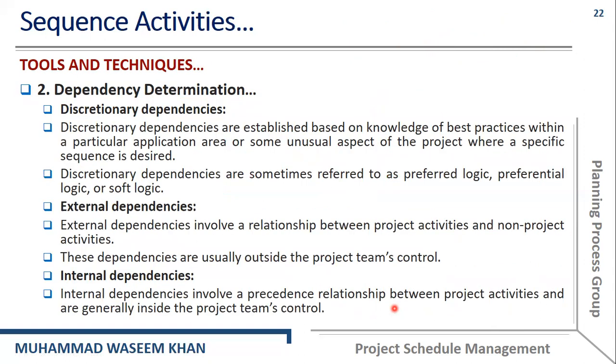The next one is discretionary dependency. Discretionary dependencies are established based on the knowledge of best practices. Here, in discretionary dependencies, we do not have any dependency that is inherent in the nature of work. We have to establish the dependency based on the knowledge of best practices.